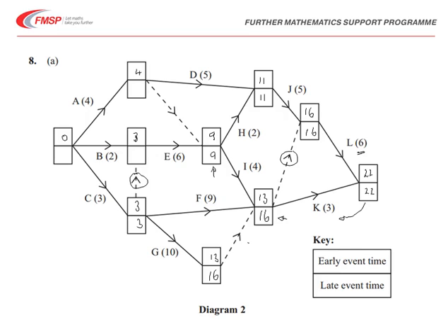The top one here, just checking that one, 11 take away 5 is 6, and the 9 with the dummy activity is 9, but we want the smallest of those, so 6 and 3 in this point here, and finally back to the start 0.